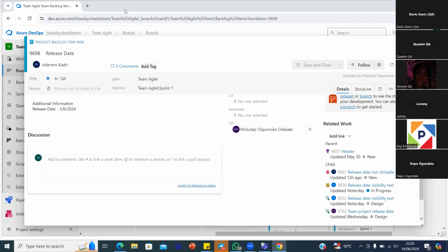Okay. So on that test case, I know some people can add a bug because they thought, oh, I have created a test case, and because that test case failed, I'm going to add my bug to it. Of course, people do that as well, which maybe you guys have done. But the only issue with that is when you go to that story, you don't see that bug in there.